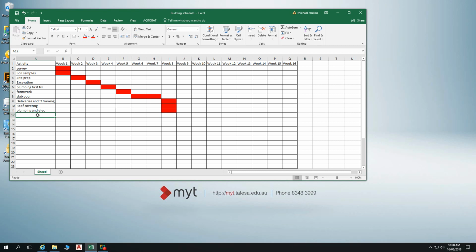Roof plumbing. So does roof plumbing happen before the roofing or after the roofing? After the roof. Depends on the pitch of the roof, really. It does, and a lot of roof plumbing happens in several stages, because you've got various different components. With a lot of your standard roofs, the first thing to go up is actually the gutter.